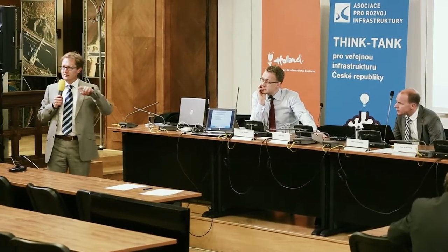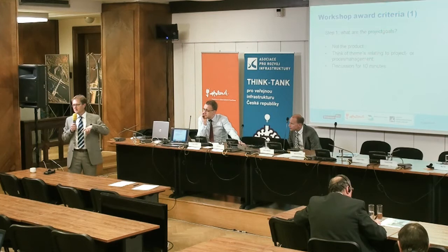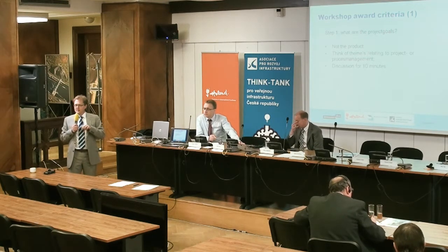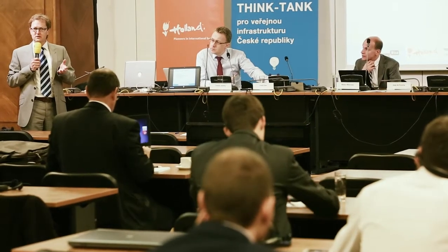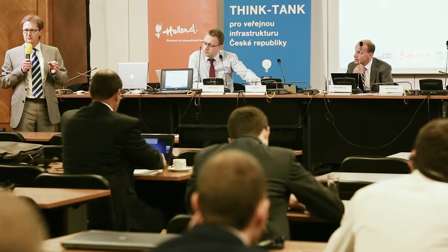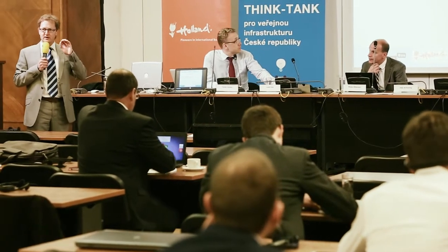Perhaps you remember this morning I mentioned a project in Amsterdam around Central Station, where we have all sort of infrastructural work, but the main project goal there was diminish the negative consequences for travelers, for instance. So that was a very important project goal. And that has nothing to do with what do I build? Do I build a new quay or whatever? No, it's about how do you do this project. That's one of the main project goals for that project. So think in terms of that.